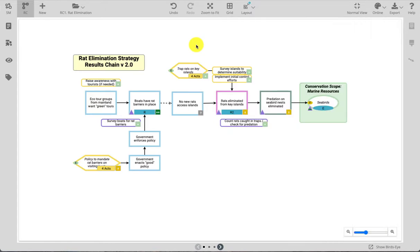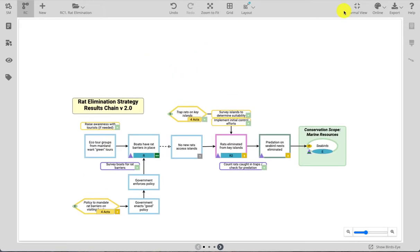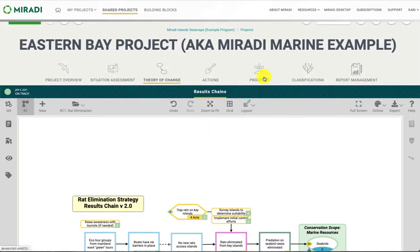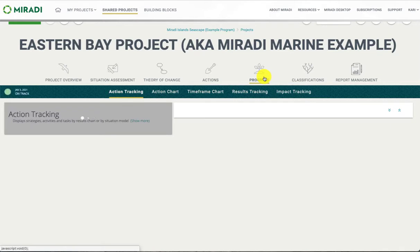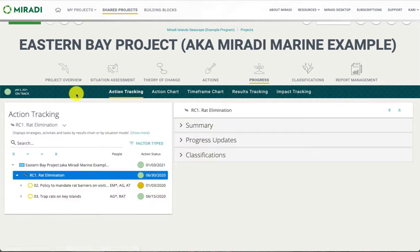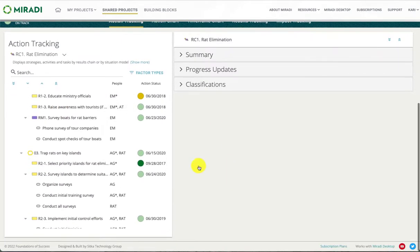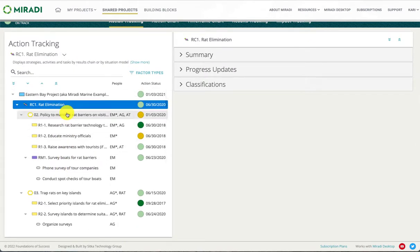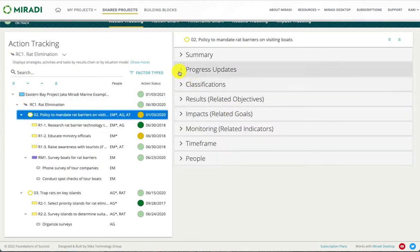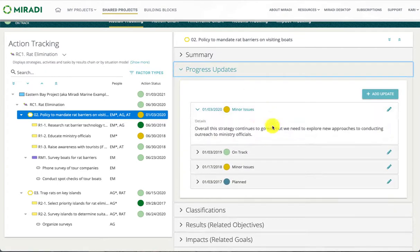All of these progress reports can also be viewed and updated in the tracking trees. Navigating back to normal view, under the progress tab you will see that action tracking, result tracking, and impact tracking trees are available to view and report on progress for different sections of your project. Under the action tracking menu you can view and update the progress status for all strategies, activities, monitoring activities, and tasks. The progress status is under the progress updates on the far right panel, and the editor is identical to the editor in the diagram window.